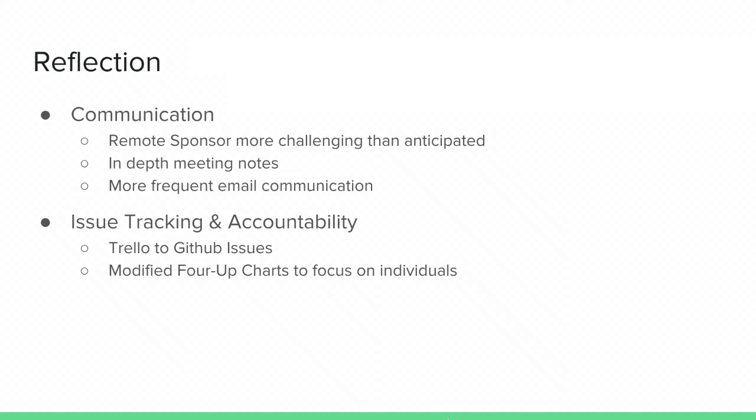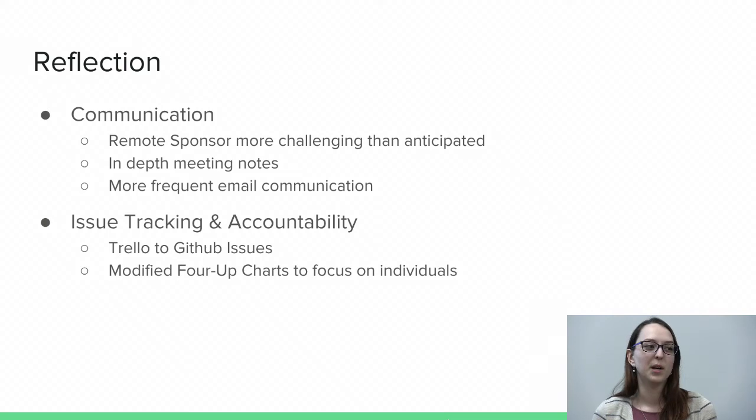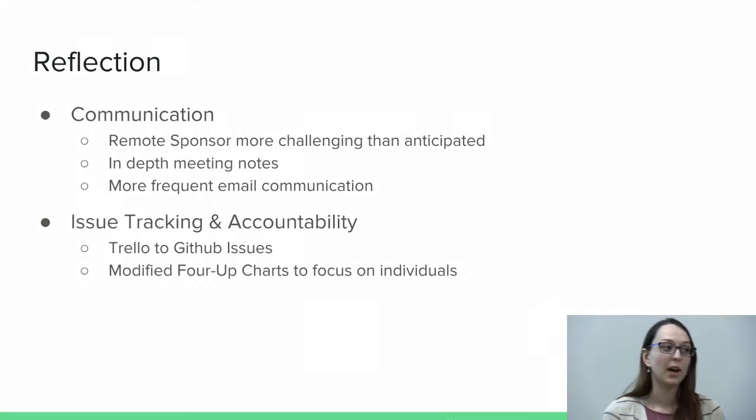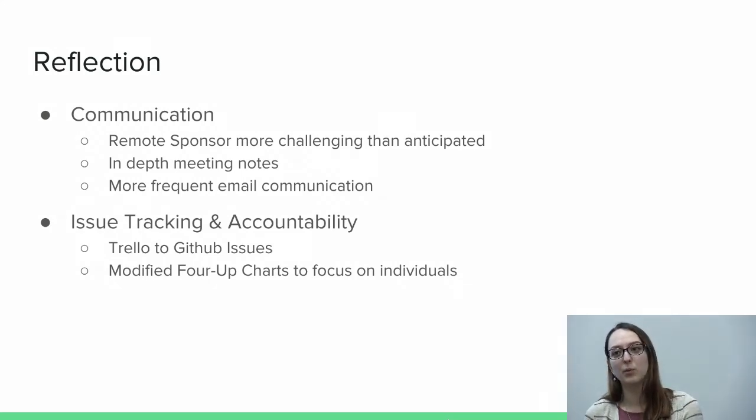Remote sponsors, they're challenging. Some of you guys have them. We all probably should have known that. We kind of did, but we didn't plan quite as much as we should have. We had the in-depth meeting notes from the beginning, but what really helped was when we started to directly send them to the sponsor right after the meeting so they could comment with any concerns that they had.